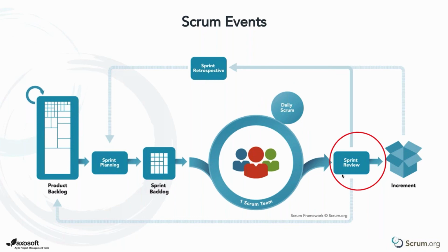The next is the sprint review. And honestly, and I think I talked about this in the beginning, I would actually bring the increment inside the sprint review and have the sprint review on the outside, not the way this is drawn here. And there's actually some work we're doing to potentially change that, because the sprint review is not a phase gate for the increment. The increment happens. The sprint review is our opportunity to review the work that was done to create that increment and to review that increment or set of increments that make up that whole increment.